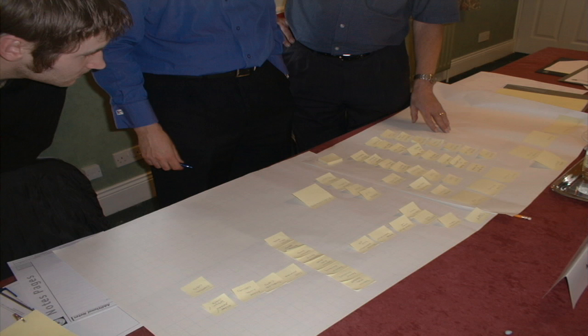By doing this, they are working out the things that they forgot on the work breakdown structure. They're saying, when you've done that, can I do this? And somebody's saying, oh, you've got to come and collect it first. So they're realizing there's a new task about collection, such that somebody is assigned to that, somebody does it, and a mistake has been prevented on the project because they're talking about the sequence of activities.